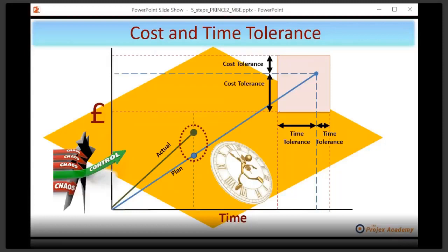Does that mean we're overspending, or does it mean we're spending more because we've done more? So in actual fact, we're going to finish early. Now, within the project manager's remit, you have the PRINCE2 process called controlling a stage. And there's two activities that you should pay attention to there. If the project manager thinks that they can bring that back and keep it within tolerance, they would use the take corrective action activity. But what the project manager will also be doing is reviewing stage status, another activity within the controlling a stage process.